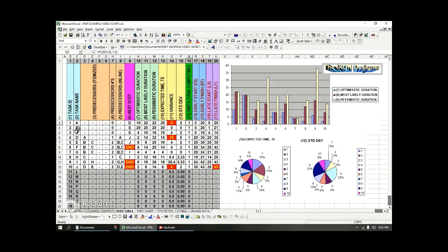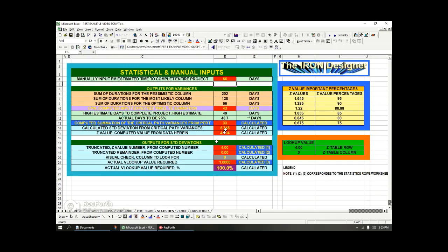You're just doing every task in order all the way down, totally ignoring predecessors and trying to get things done in parallel. That's why anything equal to your optimistic number or higher is always going to give you a 100% guarantee that you're done on time.